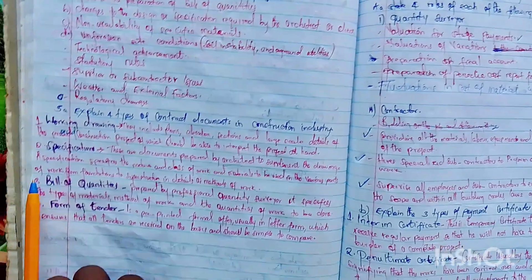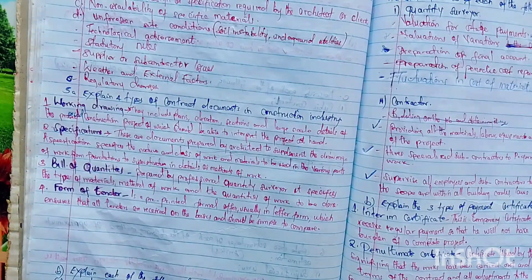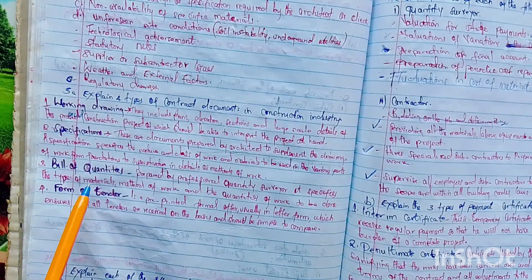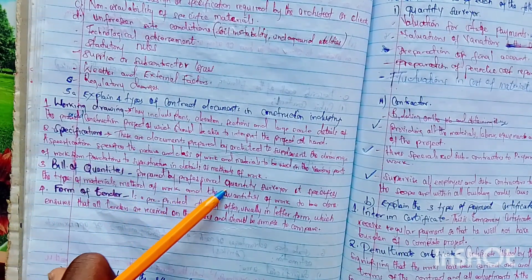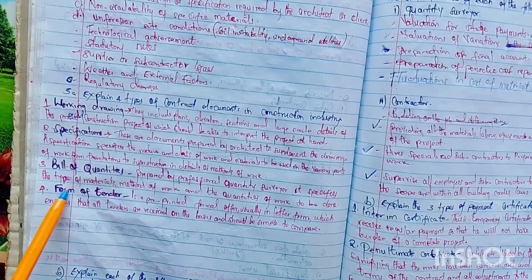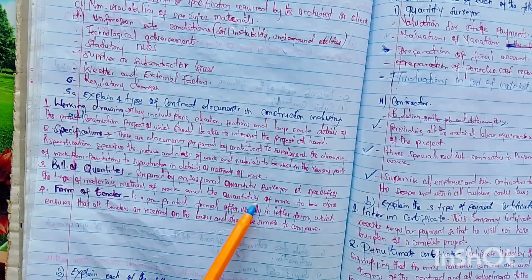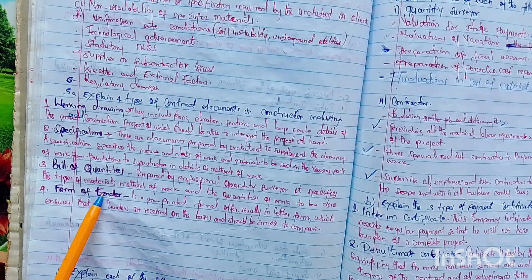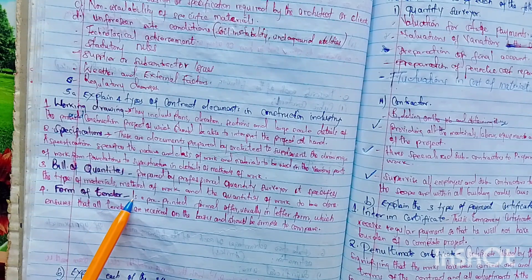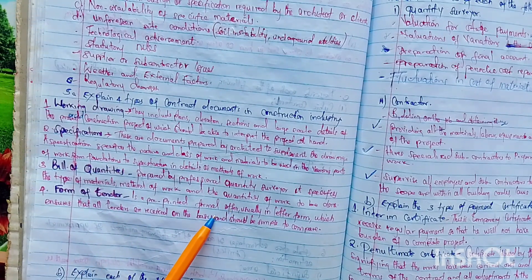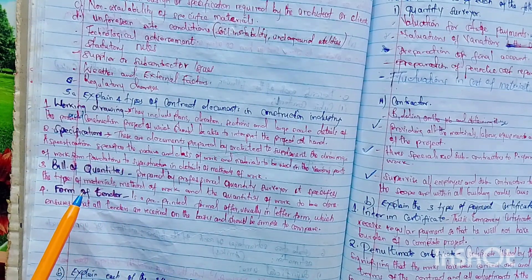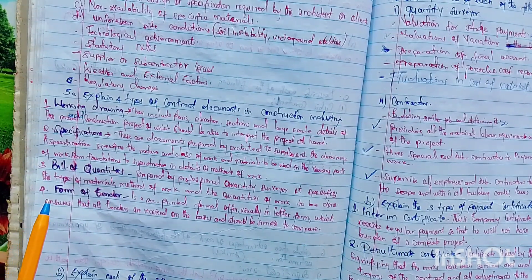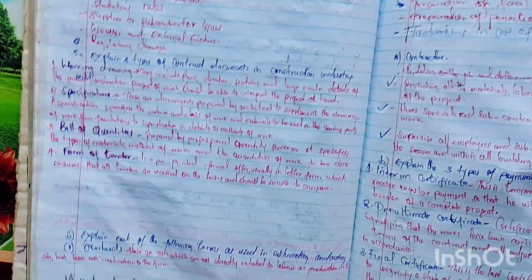Number three — bill of quantities: this is prepared by a professional quantity surveyor and specifies the type of material, method of work, and the quantity of work to be done. Number four — form of tender: this is a pre-printed form, usually in letter form, which ensures that all tenders are received on the same basis and should be simple to compare.